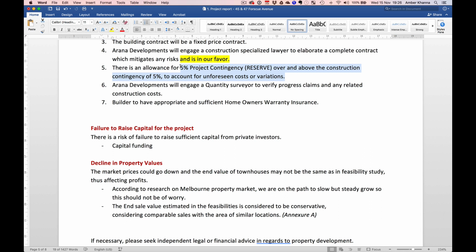That means, look, 5% contingency on construction has to be there, because when the bank looks at it, banks will not accept anything that doesn't have a minimum of 5% contingency for construction only. But for project contingency, you've got to add that 5% contingency on top of things like, let's say, miscellaneous, consultant costs and reports and any unforeseen circumstances. That's where that contingency should be.